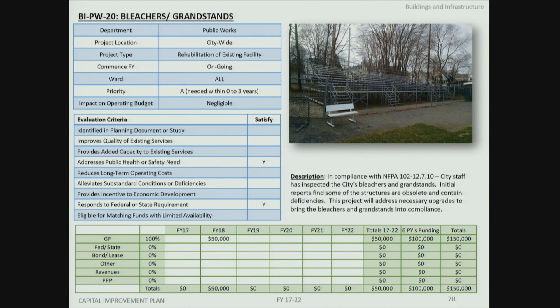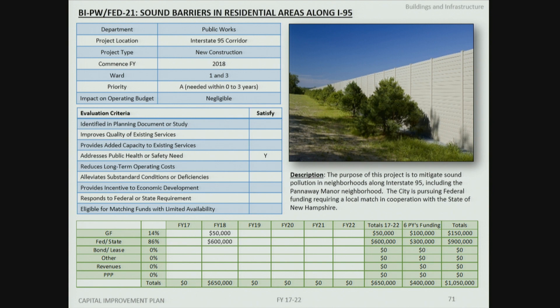Funding in an out year will continue replacement of grandstands and bleachers throughout the city. The sound barriers project addresses requests from neighborhoods along the Route 95 corridor; these projects must be done in conjunction with the DOT as part of larger highway projects. Staff is working with the DOT to explore whether barriers could be advanced separately from their projects — a previous commissioner had shown interest in this — but the new commissioner has not yet been approached, and staff will reach out in the near term.